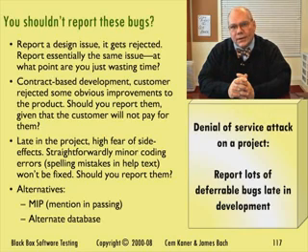Late in the project, everybody's working overtime already. You can grind a project to a halt with minor deferrable bugs. Instead of fixing bugs, the team drowns in processing bugs that won't be fixed. A project manager who sees that trend will often, aggressively, entirely appropriately try to stop these reports at their source. They're not doing anyone any good.